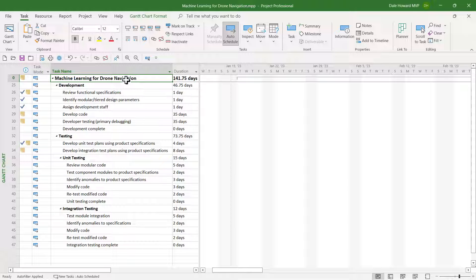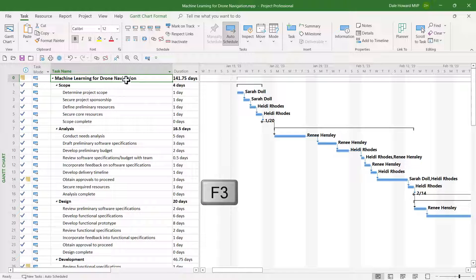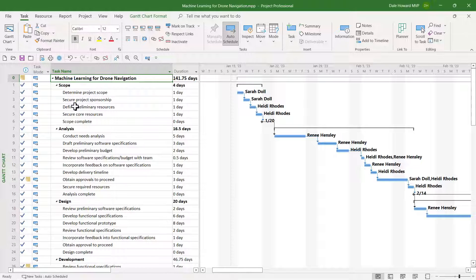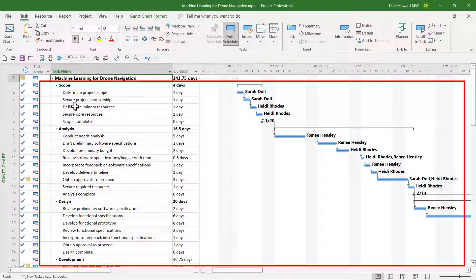When you're ready to re-display every task in your project, there's a keyboard shortcut for that. It's the F3 function key. If you press the F3 function key, that will remove any type of filter you have applied in your project.